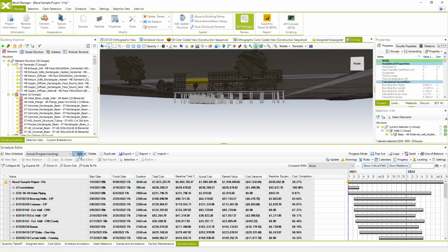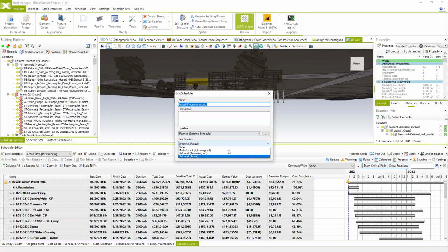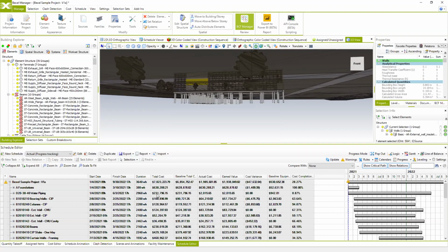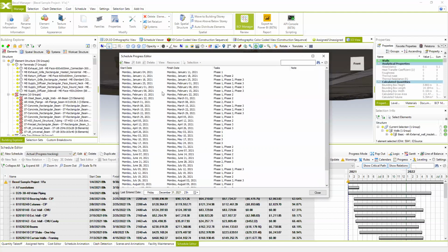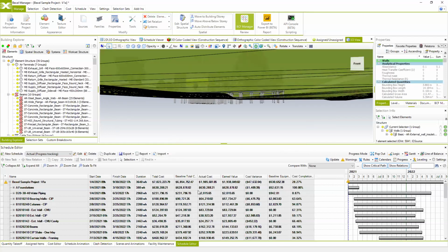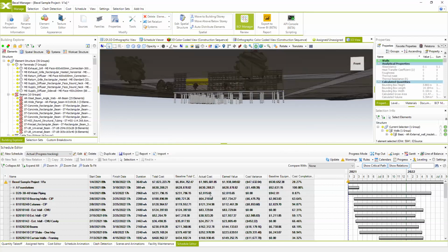Based on the progress, when you are inputting the progress, there's a lot of workarounds for that, but one of them is that every time you input the progress, you just specify the percentage of completeness without changing the resources and the price of the actual resources spent on the site.